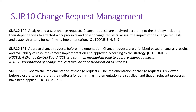BP6 talks about reviewing the implementation of change requests. The implementation of a change request is reviewed before closure to ensure that the criteria for confirming implementation are satisfied and that all relevant processes have been applied. When you document the change request, you also need to document the acceptance criteria. Once the assignee or team says the change request has been implemented, we need to verify whether the acceptance criteria and confirmation criteria have been satisfied before closing.